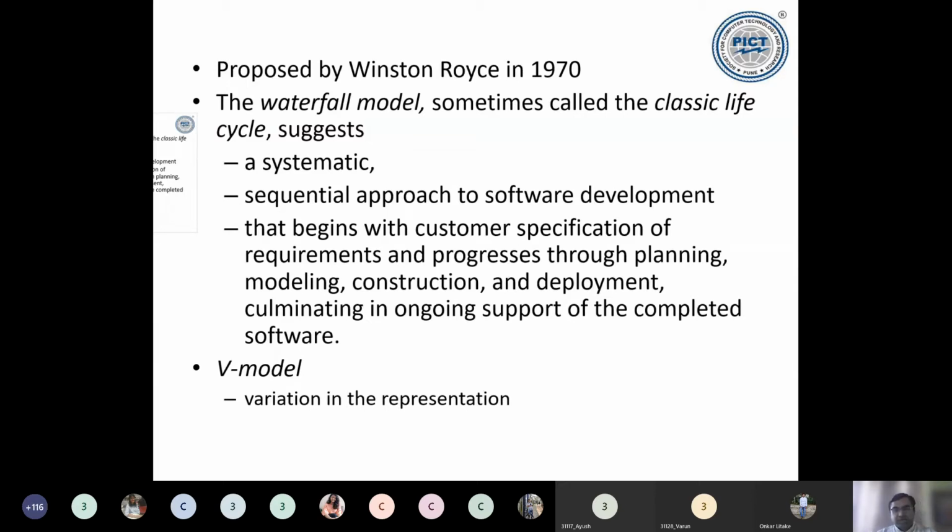So in these cases, if you want to add some kind of a change, what we expect is, if the change is there, it's a well-known change. It's an enhancement which is to be performed. So in that case, whatever additions or enhancements are being performed, we will again go through the waterfall kind of a model. We don't consider them as iterations.